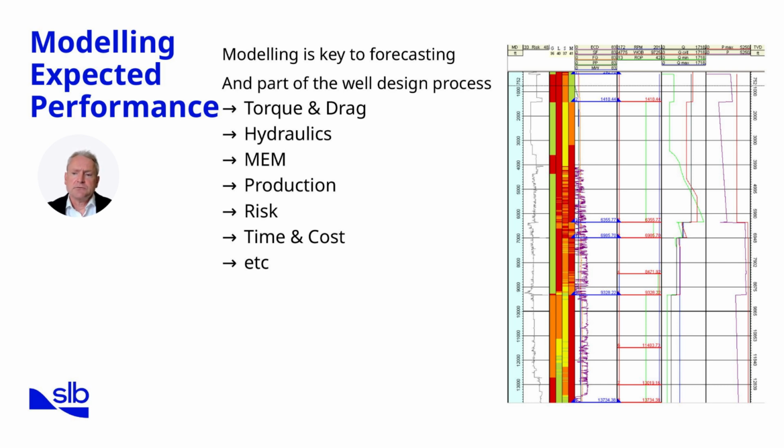Production models allow us to forecast well deliverability once drilling is complete, linking the drilling plan to long-term reservoir performance. Risk models identify potential hazards and quantify their likelihood and impact. Finally, time and cost models set realistic benchmarks for budgeting and scheduling. Together, these models provide a comprehensive picture of expected drilling performance. They allow engineers to anticipate challenges, balance risks against costs, and design wells that are both safe and efficient. However, it's important to remember that all models come with limitations. They are representations, not exact replications of reality.